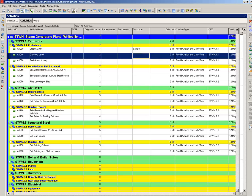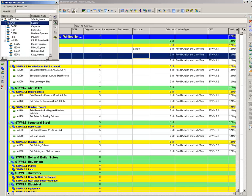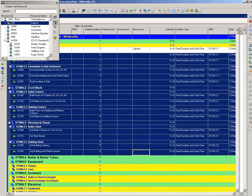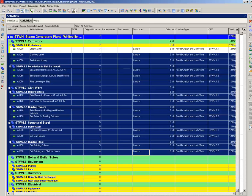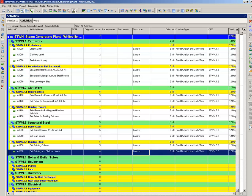So let's say you want to have a labor for every activity in here. No matter what you're doing, you're going to need somebody around to help out. Very easy. Click here. Now before you assign, you do your fill down. That was with the shift key and the left mouse key. So we filled all this down and we can assign. We've just assigned one labor to every activity in the schedule.